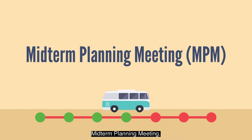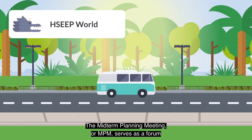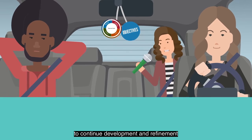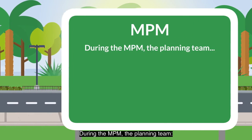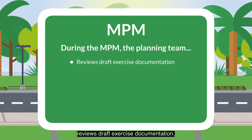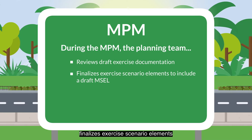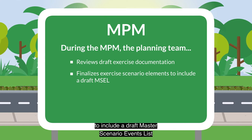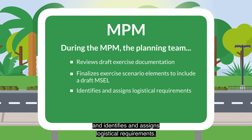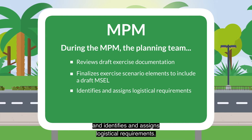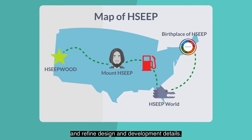The midterm planning meeting, or MPM, serves as a forum to continue development and refinement of the products and tasks started during the IPM. During the MPM, the planning team reviews draft exercise documentation, finalizes exercise scenario elements to include a draft master scenario events list if one is needed, and identifies and assigns logistical requirements. The MPM is the time to update and refine design and development details.